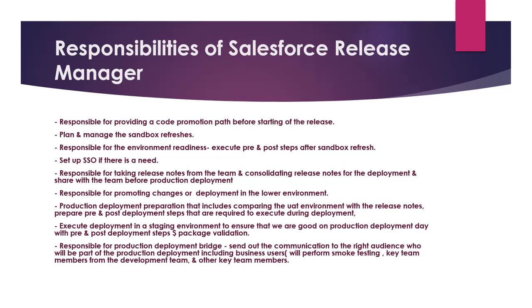And if there is a need, we need to set up SSO for the UAT or the full sandboxes where we'll be performing end-to-end testing. The person is also responsible for taking release notes from the team and consolidating them for the deployment and sharing them with the team before production deployment. And the person will be responsible for promoting changes or deployments in the lower environments as well.